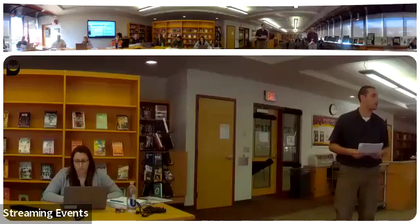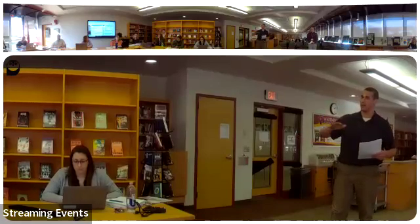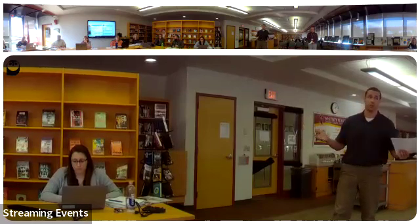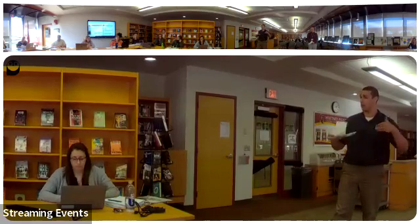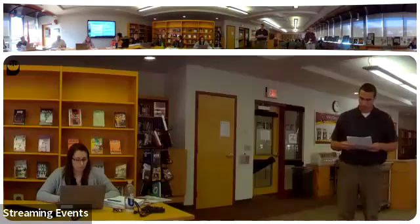We were just talking with the contractor today. They're going to be framing walls. They've advanced the flooring far enough that they can start framing walls, which opens up other scopes of work for the MEP contractors to do their roughing. So work is progressing up at tier A, which is great.